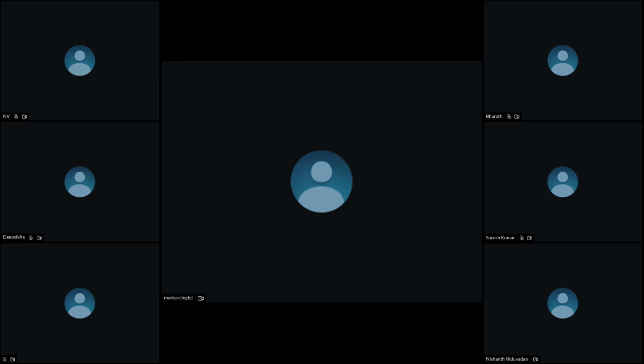For example, if I'm going to develop an e-commerce portal, my UI should be completed first, then coding will start next, then testing, then everything will be done, and the final testing or SIT should happen. Once all this is done, then we push it live. So my sequence should be there inside the schedule management. Is this clear?